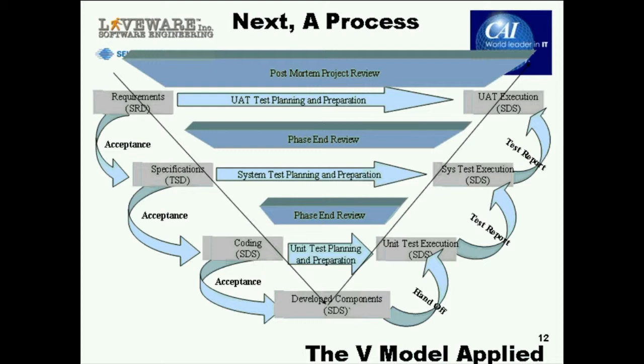So requirements and requirements building is the tool that we use in order to build a communication link between the two sides. Requirements management in this context is the way we make sure that all requirements are in place and that the requirements are taken care of throughout the project. Requirements engineering is linked to the elicitation, the modeling, the validation. There are different schools divided into 3, 4, 5, 6 different activities. But the basic ones are eliciting, modeling, and validating.